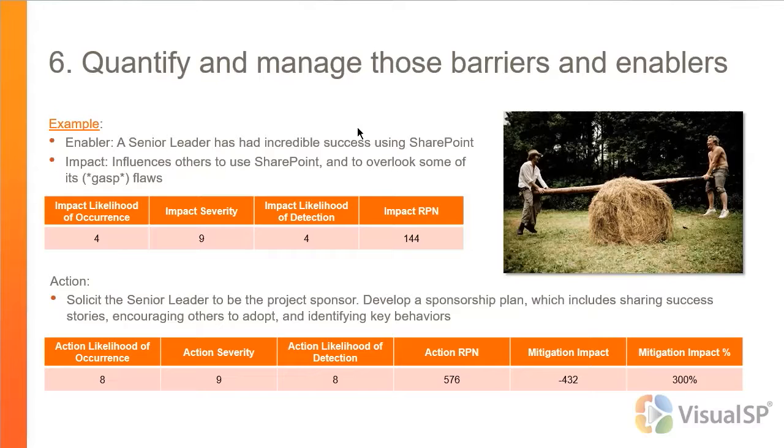But here what I've done is build on this situation where we've got somebody who had previous success in SharePoint, and I just asked a few questions. What might the impact be if we ask this person to describe his experience to others? And what specifically could we do to actually encourage him to do that? And then how valuable is focusing on that relative to either managing other risks or cultivating other opportunities, so that we know where to put our resources when we're starting the influence phase of the project, which is throughout the entire project.